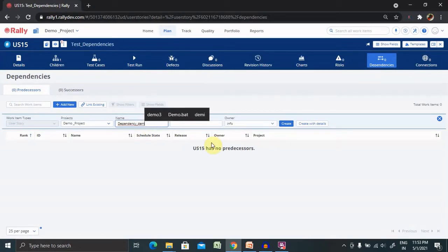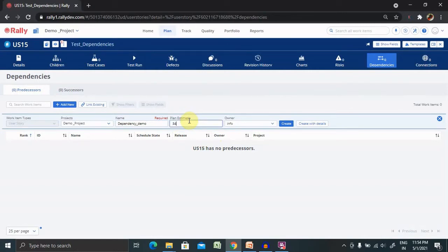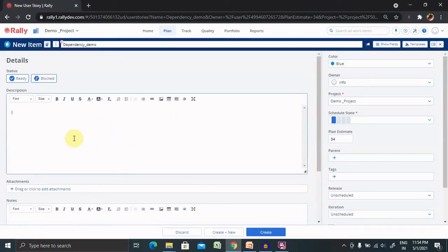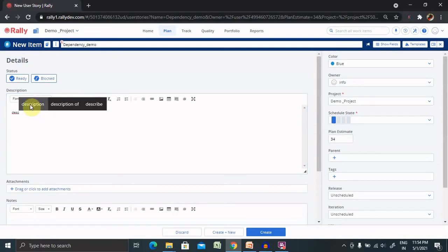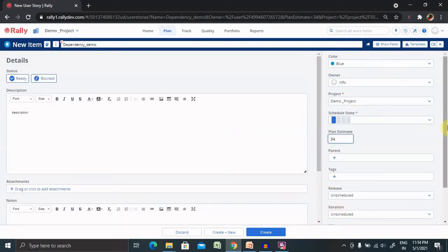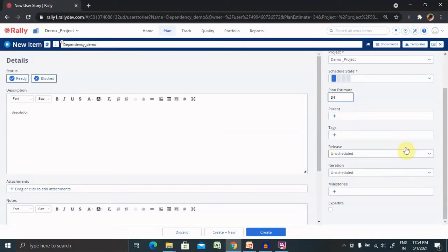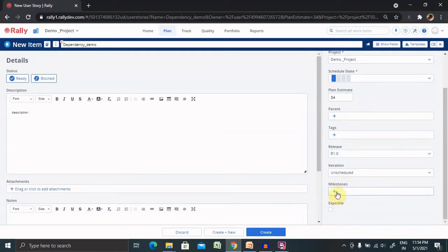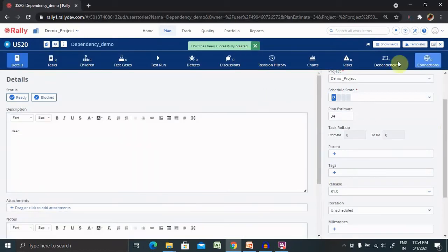I'm estimating the plan estimate as 34. Once we click 'Create with Details' we need to provide descriptions. I'm adding a description here, and you can also attach any attachments. Nodes and everything work the same way as creating a user story — you can assign releases. I'll select R1 as the dependency release, and if you have any milestone you can add it, otherwise keep it blank. The dependency is now created.